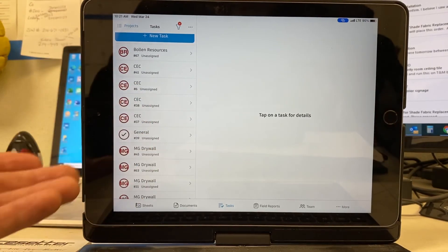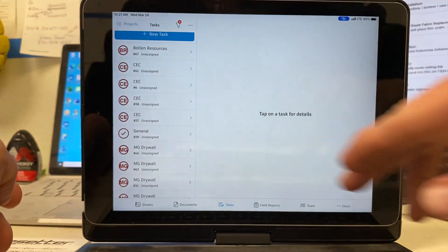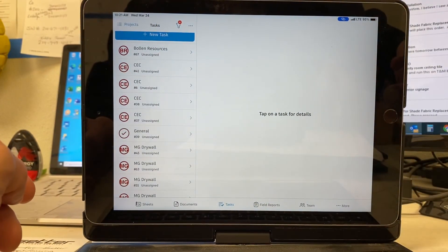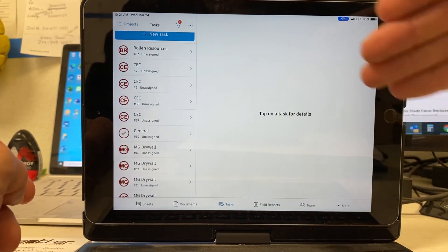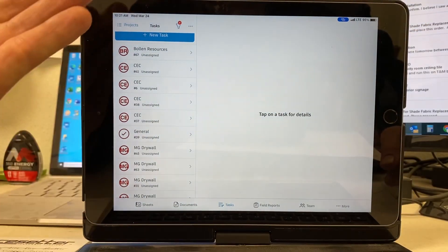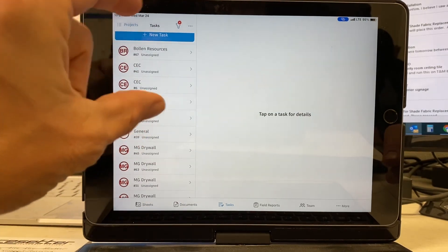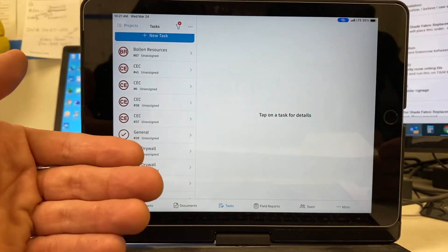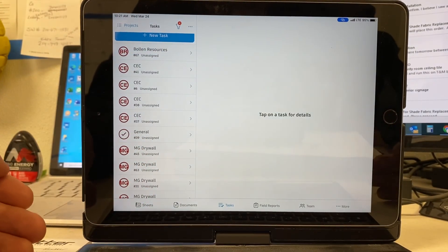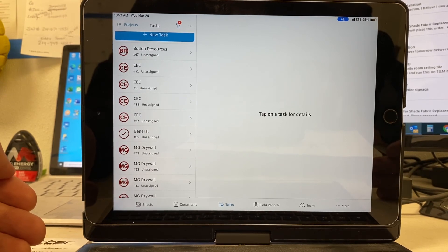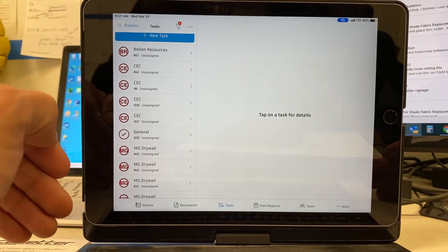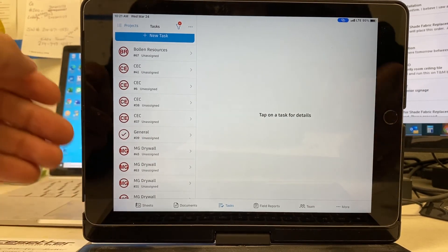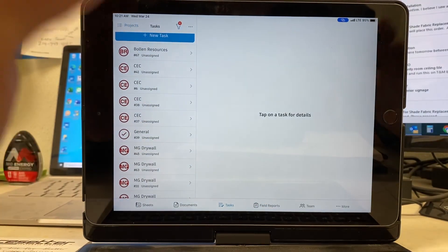If you send it from the computer, you are able to organize it differently. Whenever you hit export, it doesn't just throw it in an email. It lets you organize it before doing that. And you can organize it per stamp, which automatically groups it per subcontractor. And it makes it very clean. So if you'd like to send out a clean punch list on the first go, get with your PM, have them watch the video if they have any questions or call me and send out from the laptop so that they can organize it per subcontractor. And it's very clean.